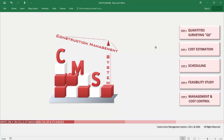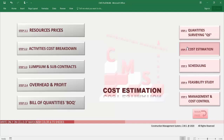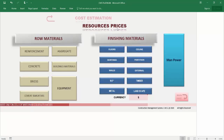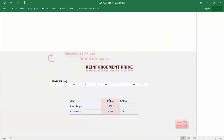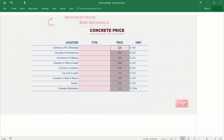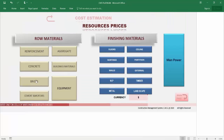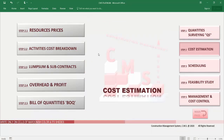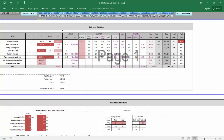When you click on cost estimation, you find step 2.1 — resources pricing. When you insert only the resource prices according to your area or country, CMS takes those prices and generates all cost estimation for each activity and for the full project. You insert only the prices for rebar according to your location, concrete from your suppliers, aggregates, blocks, cement, and even the prime cost or purchasing price for finishing materials. After inserting material costs only, CMS automatically makes an activity cost breakdown for each activity in the construction project.